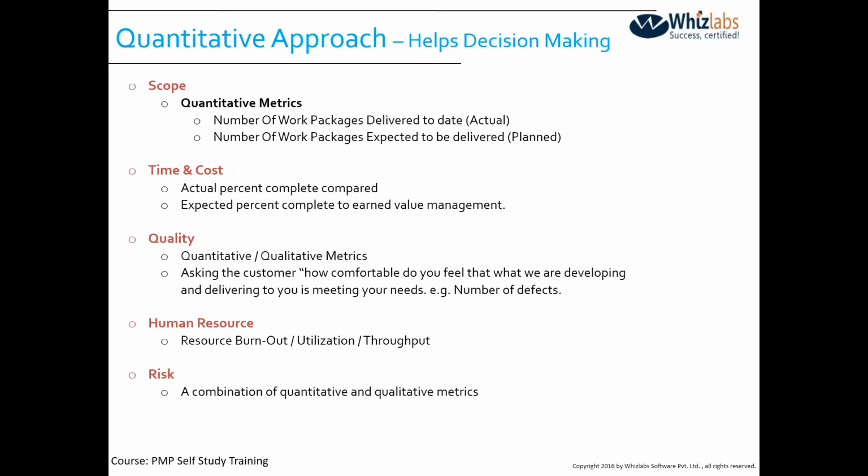The most common type of measure we use in any project is resource utilization. I have seen many projects where the data you capture only talks about resource utilization. We don't capture any other kind of data. I assume all of you understand what I mean by resource utilization. We see whether the people who are part of the project are 100% utilized. We come across numbers like, out of 10 resources, 5 are 90% or 80% utilized, and a few people are more than 100% utilized. Based on that, we look at why people are not 100% utilized or why people are utilized 120% or 130%.